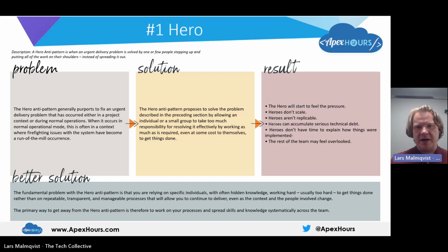So some specific things you can think about is embracing more of a DevOps culture, right? Having smaller incremental releases, doing things in a more granular, agile way, building up multifunctional teams that have a lot more internal collaboration, trying to distribute knowledge consistently, not just at particular points in the project, so that you don't have so much reliance on individuals. Encouraging and rewarding team members, not just for stepping up and putting out a fire, but also for mentoring and developing their colleagues.